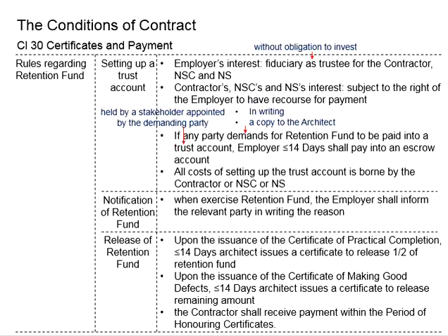Theoretically, the liability of the contractor has completely ended after the certificate of making good defects. For that reason, there is no need for the retention fund to be held by the employer.